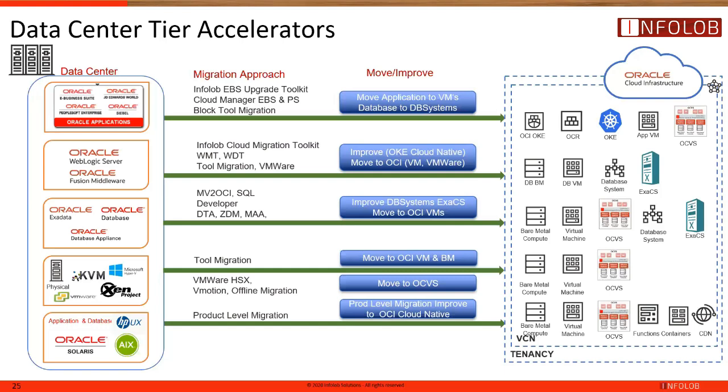Usually what you want to do is do an initial migration and then do incremental updates periodically through the migration process, and then do your catch up on the migration right before go live. So both of those things we would recommend using through the process.